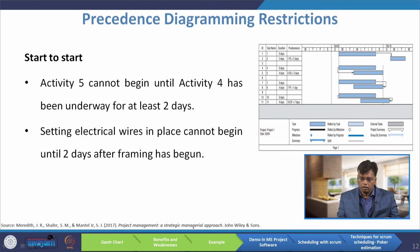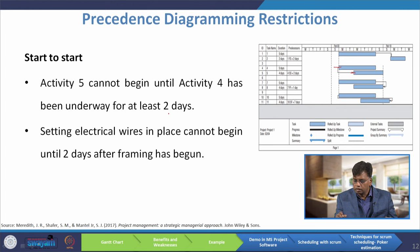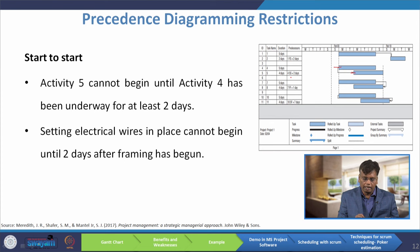The next relationship is start-to-start. The arrow starts from the start point of the predecessor. For example, activity five cannot begin until activity four has been underway for at least two days — written as 'start-to-start plus two days.' This means activity five starts two days after activity four has started. A real-world example: setting electrical wires in place cannot begin until two days after the framing has begun.